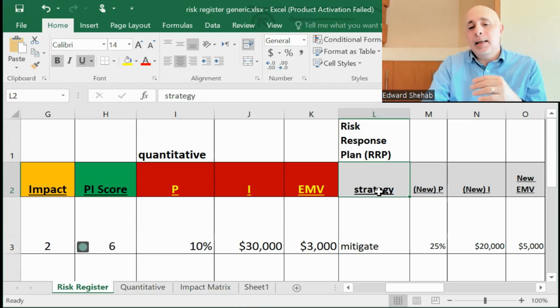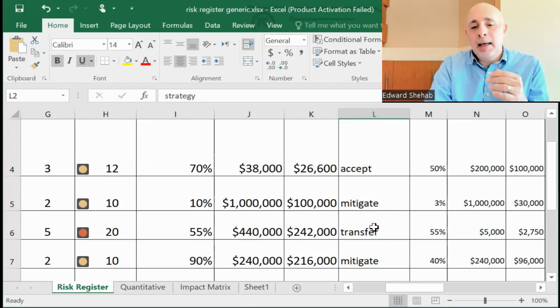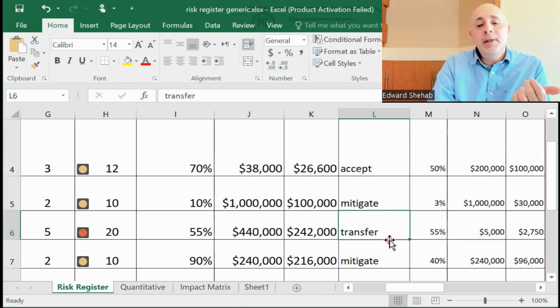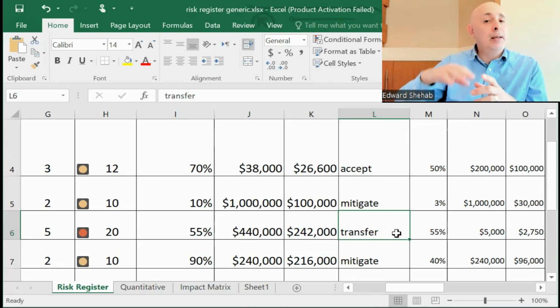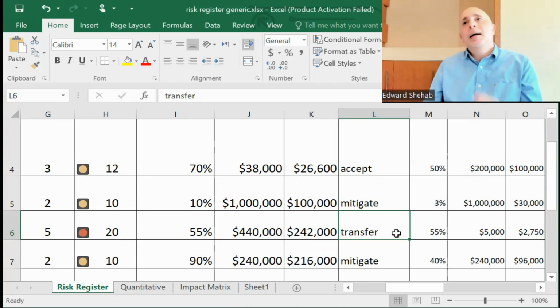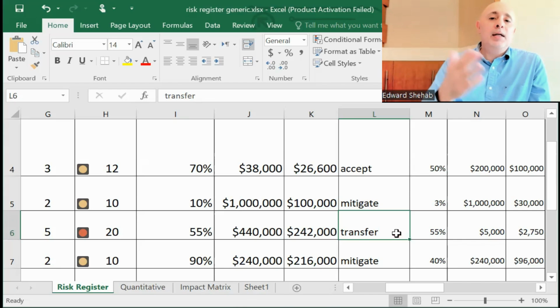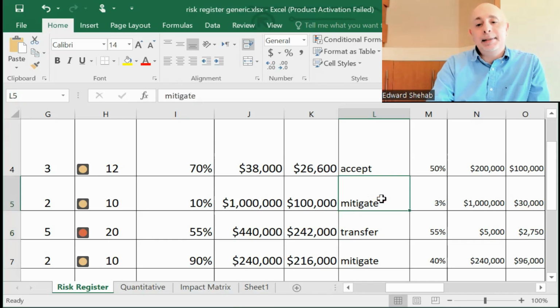The second strategy that you want to use other than avoid would be to transfer, which is this one here. To transfer means to outsource the work or to buy insurance. So if there's a way on my shipment, I can outsource it to somebody else to do it, and they will be liable for anything that goes wrong. I'll pay a price, a premium, they do it. Or I buy insurance. If anything goes wrong, the insurance will cover me.